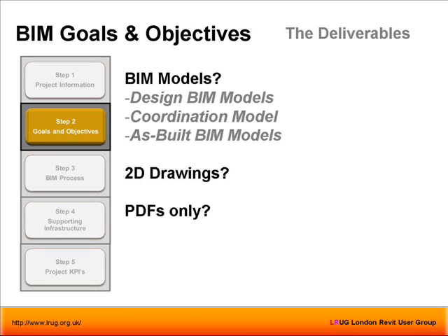So how many site visits and monitoring of construction did you do to actually make sure that what was designed was what got built? Now that was interesting. We had a clause in our BIM Execution Plan. A cop-out or a clause? Or caveat, or whatever we call it, that said the contractor is responsible for providing as-built information to the team, and also responsible for validating that the as-built models are in sync with the information that they provide. So at the end, the contractor was responsible for checking and validating.